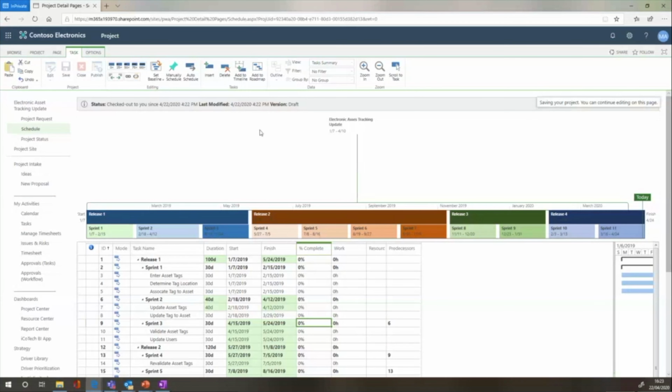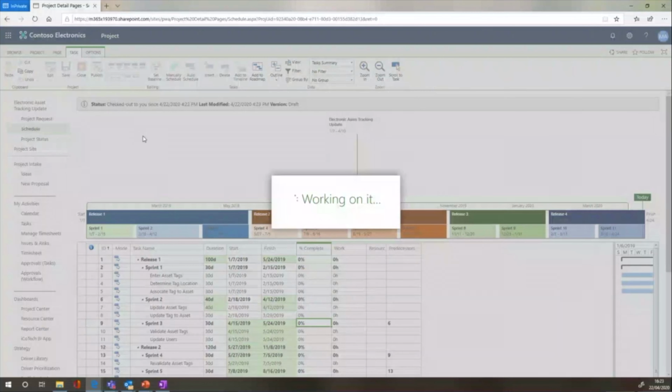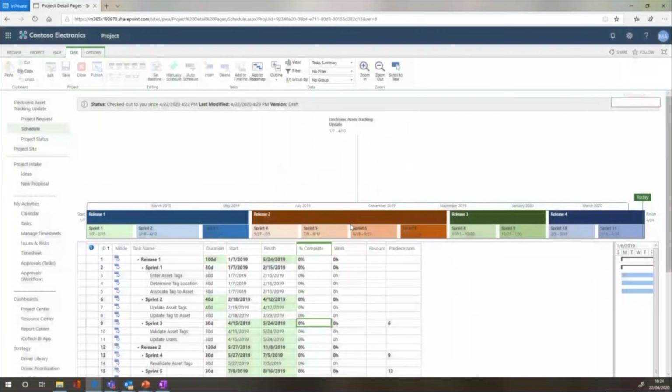So yeah, what that was doing was giving me my own version of the schedule. For example, on Sunday night, if I want to do some scenario planning, I can go and modify the plan, but not publish it to the reporting server. So it doesn't throw out all those lovely reports we'll show you later on. It's just a scenario. Only when I've published it does it actually publish to the reporting server and then apply those KPIs that we saw earlier.